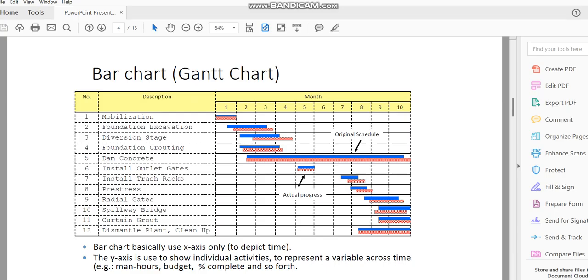So let's say when month 2 comes already, you look at the amount of meter cube of month 1. You need to check at the end of month 1 or at a certain date of month 1, let's say the 21st or 22nd or 25th, when you need to produce a report. Usually we will do some calculation of the tracking, and you need to cut it off at a month. Okay, that's definitely. You need to cut it off.